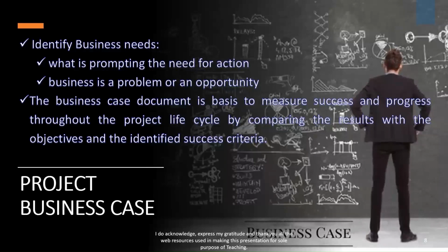So you write down a success criteria. And why is 60% sales minimum required? Because if you don't sell 50% of the product, or if your plant does not work more than 50%, you don't even get a break even. So you have to build your profit margins, and that profit margin will be coming from the business benefit management plan. We'll see that. So that's why success criteria has to be developed and should be kept crystal clear.